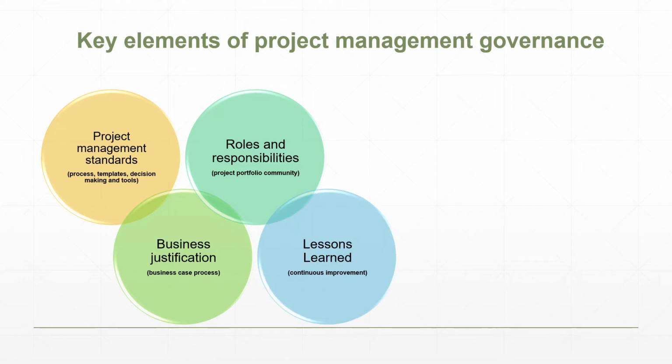Lessons learned. That's very much around continuous improvement, and building that in as part of governance means that there would be a process, there would be a log where all these lessons are learned. These would be booked into people's diaries. This is something that happens often and is reviewed. And it's not only that it happens for just project managers and their coordinators, but actually it's happening all the way from the top. So you have program directors and program leads. They are also facilitating these sessions and leading on them and ensuring that they happen.